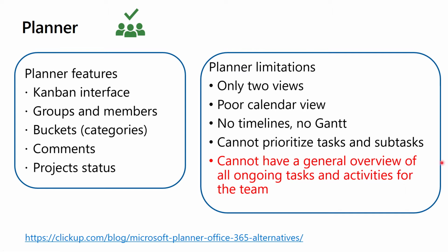And the other point was the missing Gantt view. Again, if you read all the tasks from Planner into Power BI, you can then use a custom visual in Power BI, a Gantt custom visual, so you can have your Gantt easily in Power BI.